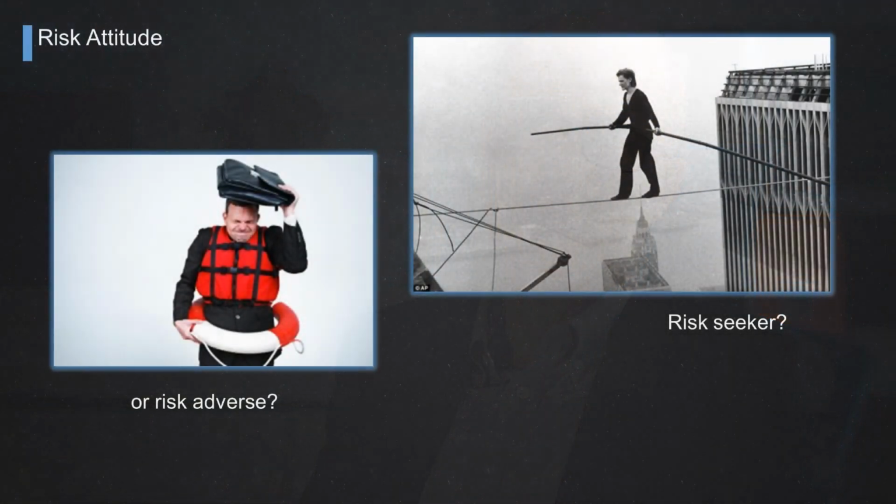Every action, every activity has a risk for these people. So when we make the assessment, we will face the different attitudes of the people. We will have in the team people that are risk seekers, and people that are risk averse, and they will evaluate the same risk in different classes. But we need to have a weighted measure of this risk.